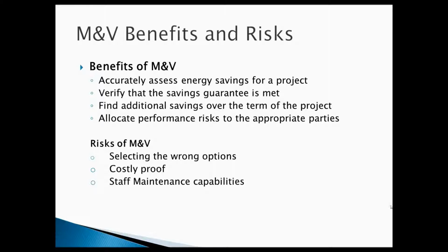The other thing is the risks are allocated to the appropriate parties. You're measuring and verifying. The risks are allocated so that if you don't obtain your savings, your service provider needs to write the check.